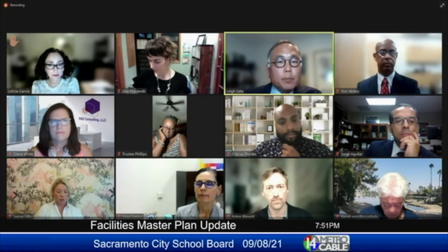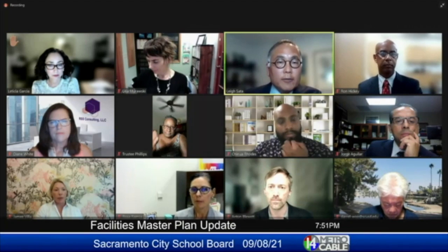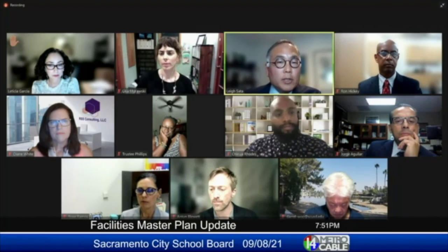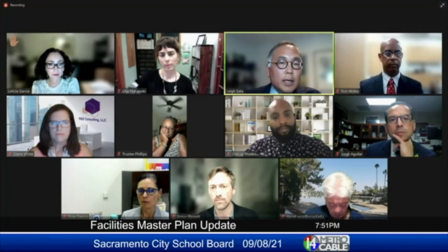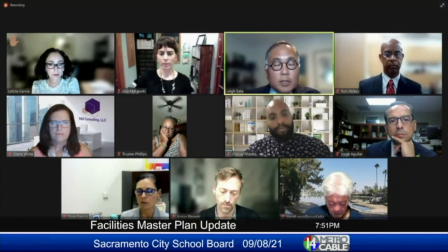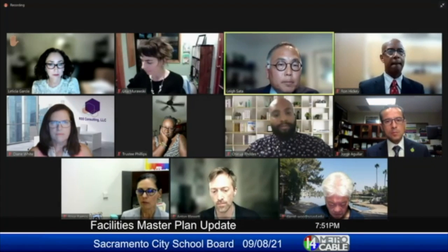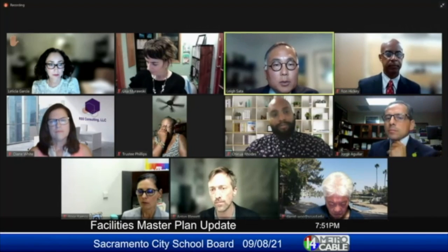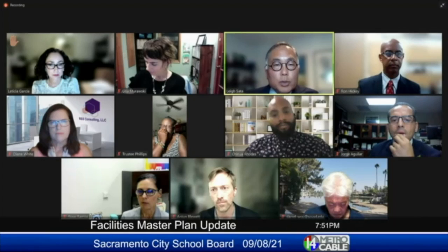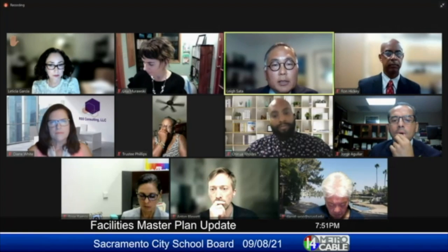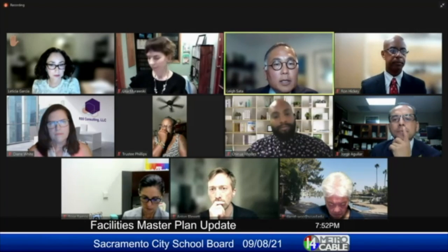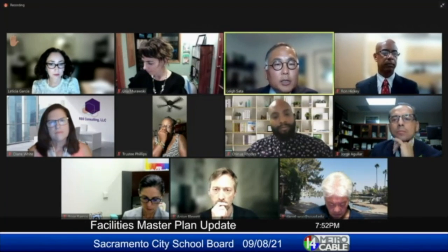The tool is intentional in its ability to provide choices for the staff while still providing a very strong data-oriented approach. So in other words, if we found a school that had several defects leading to health and safety issues, and if it's particularly egregious at an entire campus, we have the ability to move that project up onto the list to move forward. And the FCI, the Facilities Condition Index, in general applies to all schools across the district. So while there are certain neighborhoods that have certainly been historically marginalized and the data points to those schools as qualifying for the visionary allocation, if you will, there are additional funds and potential other sources and the ability to add other schools purely based on facilities condition that are encountered, particularly if it creates a health or safety or other liability issue for the district.